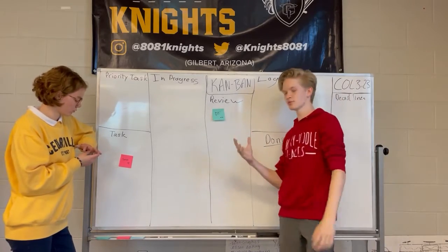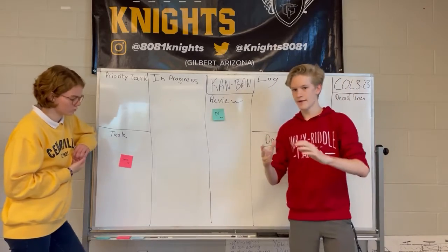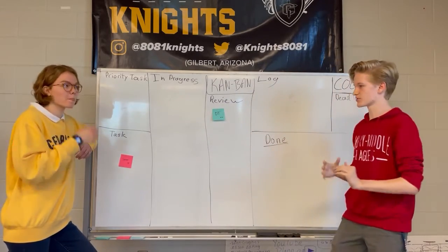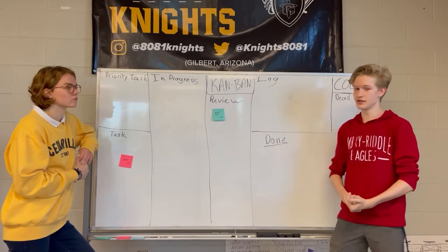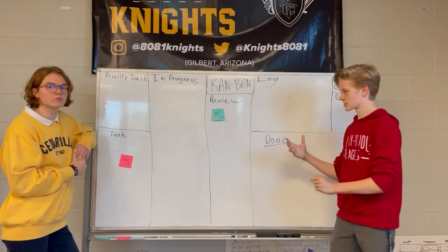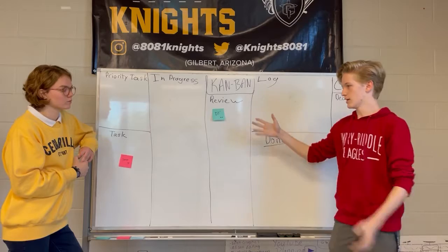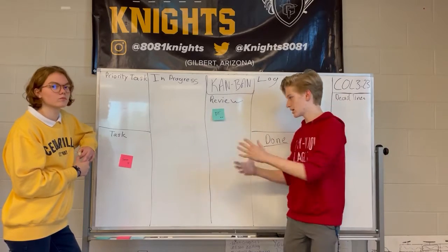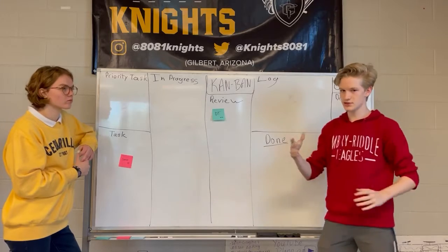So after you're done with your progress, you put it in review. This is a little bit of a safety mechanism. You put it in review, you have someone else, not yourself, but someone else that has higher experience or higher authority, a parent or mentor or a coach or a captain, anyone with prior experience in building, come over, review the drivetrain and say, hey, I need to go check it or whatever, or you go to that person and say, hey, where's this object?